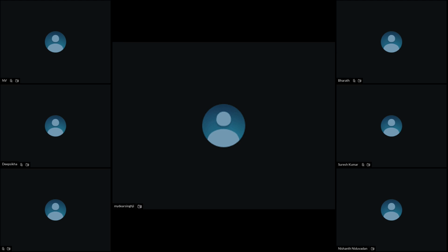So I'll give you an example here. Suppose I want to develop one payment module, then what is my work breakdown structure for the payment module? Like design the payment flow, create the API integration, then configure the payment gateway, then execute the testing phase, and then the complete deployment. So I'm just defining the activities of the payment module. Is this clear? Yes. Very good.